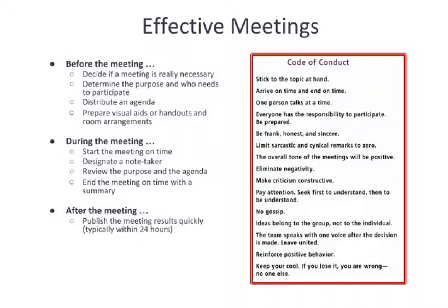A designated note taker, because you will be running the meeting, trying to keep things moving and staying on track with what needs to be discussed. If you're taking notes at the same time, it's distracting. Once the meeting is finished, you need to follow up with written communication, typically within 24 hours or so.